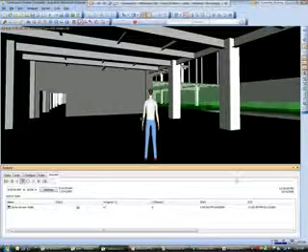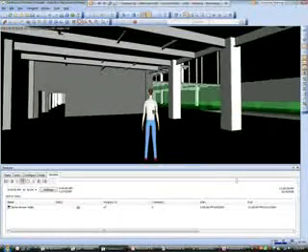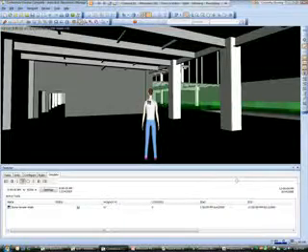We can also look at it from an equipment standpoint. Maybe we have a small excavator or a crane on site for this particular job. Looking at it from a different view, we might realize that we can maximize our productivity if we have two cranes on site and speed up the full overall construction process. And we can start doing these what-if scenarios just by dropping in different items. So at this point, we're looking specifically just at the model. We're not looking at any additional elements within there.